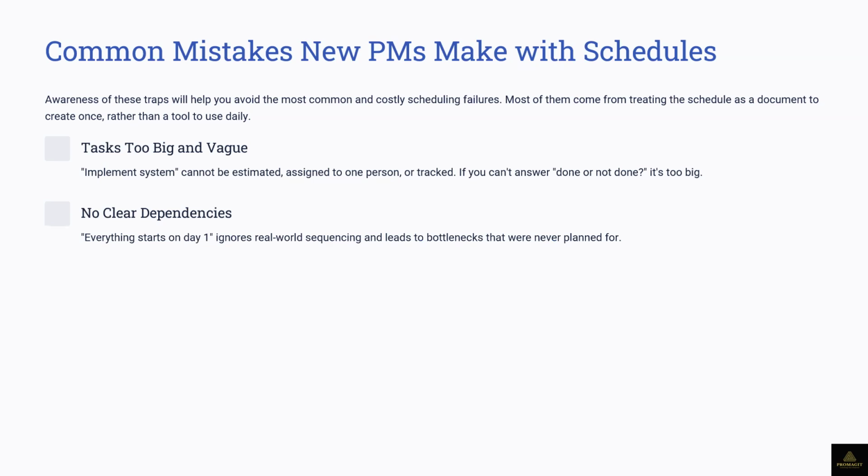Basically, for every activity you are doing, does it depend on another activity, or does another activity depend on it? So you must know what depends on it and what that activity also depends on, because every activity is in the air. There are certain things that depend on it, and there are also things it depends on. So you must know where that lies and sequence accordingly. That's why the sequencing of the activities is very, very important, because it's going to affect your duration. How you sequence your activities is going to affect your duration, and it's going to show how smart you are, or how smart your organization is.